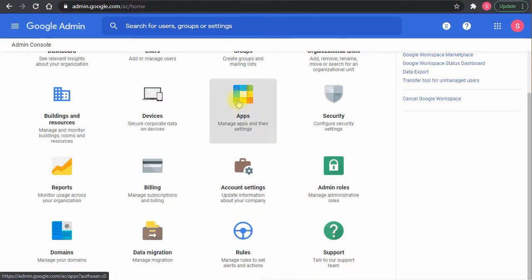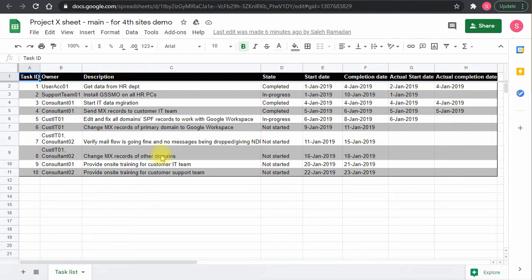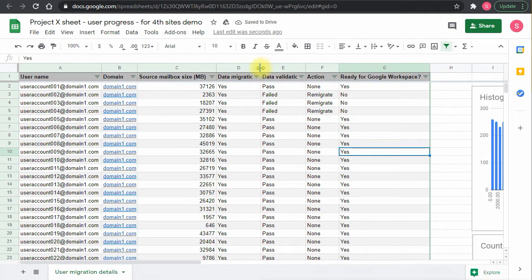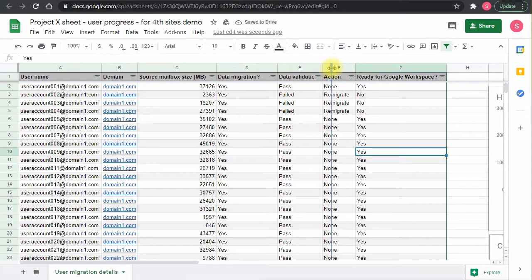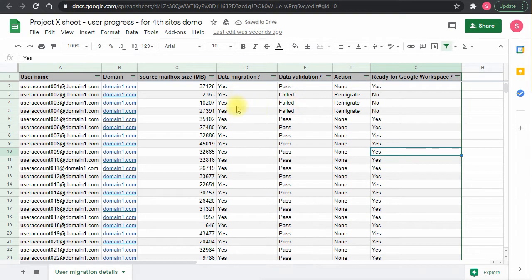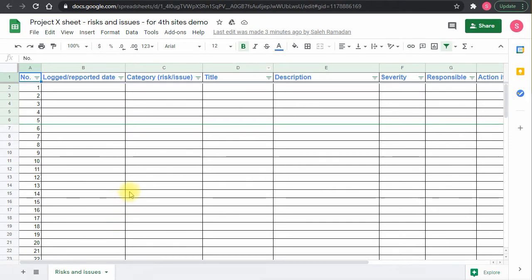For this, I've prepared three Google Sheets. The first is a basic task list — not anywhere near what we actually get in a real Google Workspace migration project, but just a sample to give you the feeling. The second sheet is the actual user migration details and tracking: username, domain, source mailbox size in MB, data migration status, data validation status, and the action to be taken.